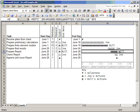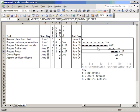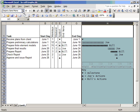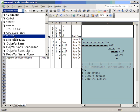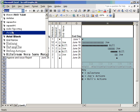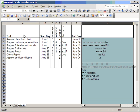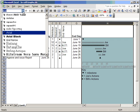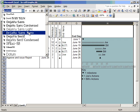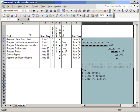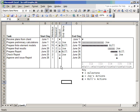One thing that you would have to use though is a monoscript. Now a monoscript has each character has the same width. Now that's not true of all fonts. Let's put this into something like Arial. OK. That doesn't work quite in the same way because a blank character isn't as wide as this particular character here. So it's very important that you select only monoscripts. So I'll just switch it back there to a monoscript. And there's a number of monoscripts that you could choose from.